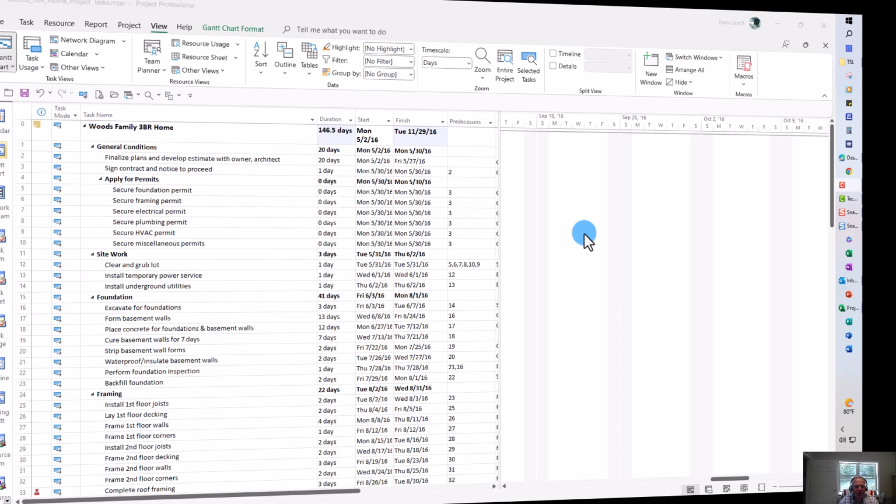And when we start adding tasks into our Microsoft Project, when the tasks get added, they are set up with a default relationship of finish to start. There are 4 kinds of link relationships between tasks. What the finish to start relationship means is the second task can't begin until the first one is 100% complete.